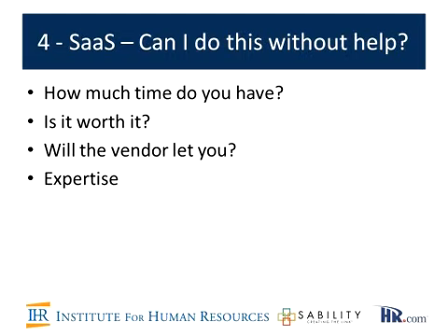The other thing, in this SaaS model, is a lot of times the prices you get quoted are going to be fixed fee. And with the fixed fee model, they want to get this done as fast as possible. So unless you have hours built in for some of this knowledge transfer, it's sometimes going to be difficult to get the vendor's attention. However, we repeat again, you are the client. You have rights when it comes to all these things, and so you really need to communicate very clearly what you're looking to do and also be reasonable with your expectations.